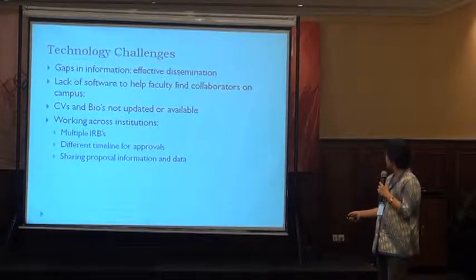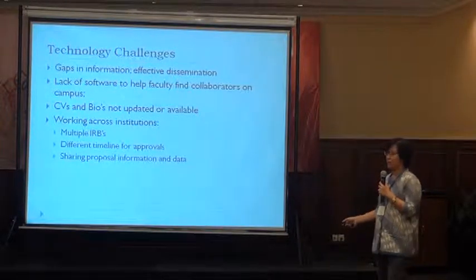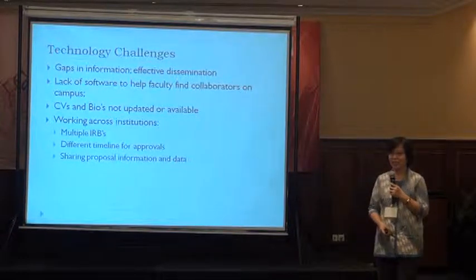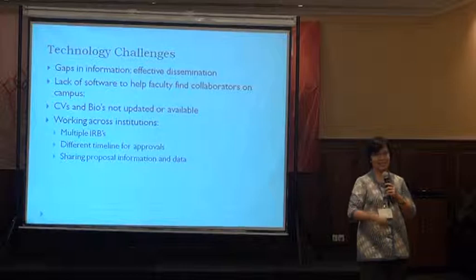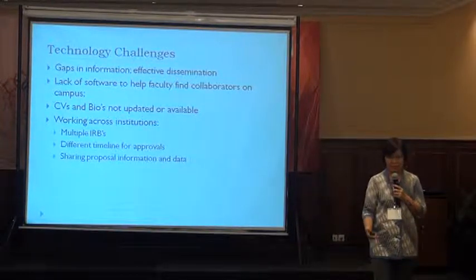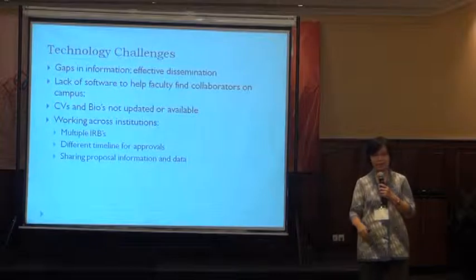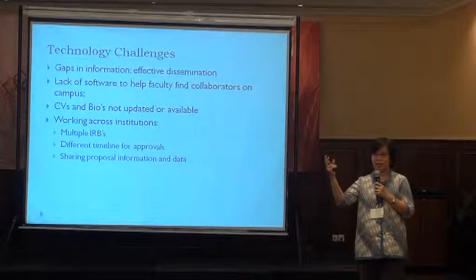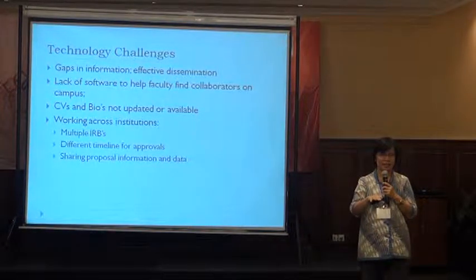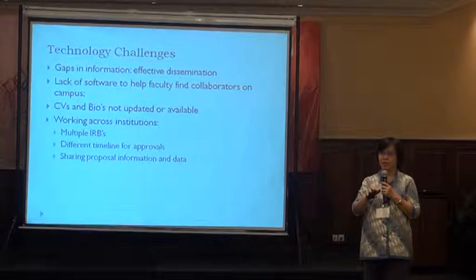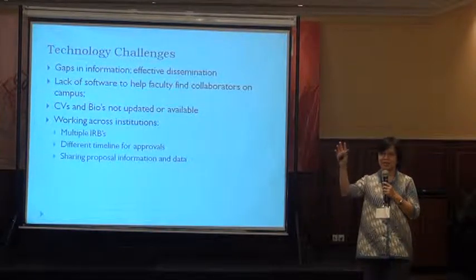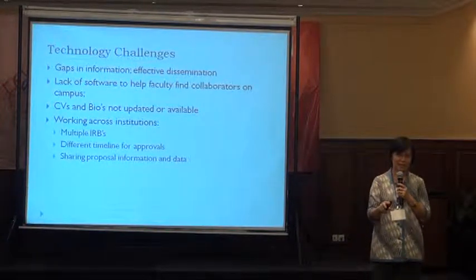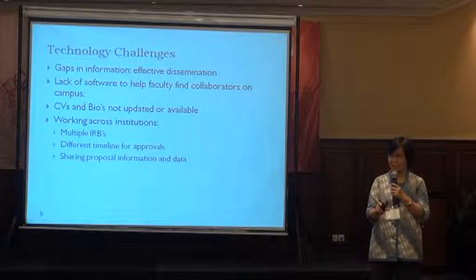Working across institutions, if we involve other institutions, then the challenges would be, do we need the ethical clearance from each of the institutions? I think one of us has experience when research is led by a partner outside Indonesia, but then the research is done in Indonesia, and if we are not aware that even though the ethical clearance has already been issued in that country, we still need the ethical clearance from where the data collection is carried out.